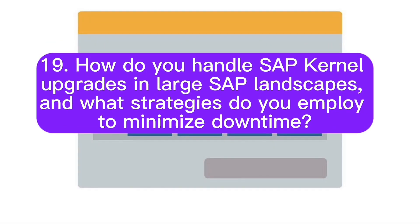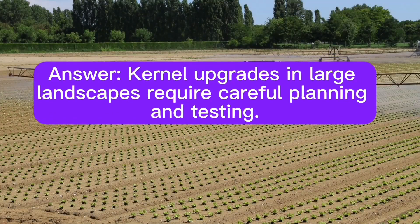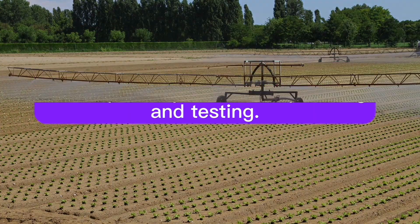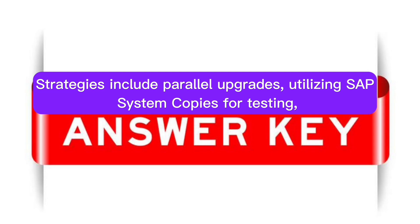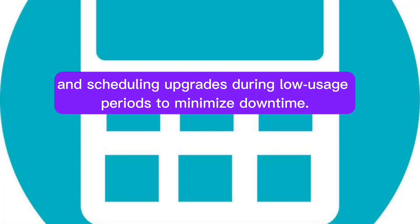Question 19: How do you handle SAP kernel upgrades in large SAP landscapes, and what strategies do you employ to minimize downtime? Answer: Kernel upgrades in large landscapes require careful planning and testing. Strategies include parallel upgrades, utilizing SAP system copies for testing, and scheduling upgrades during low usage periods to minimize downtime.